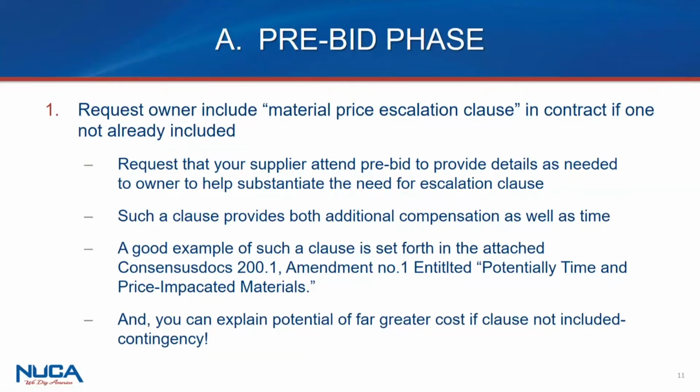And insofar as the issue that we're talking about today is driven by the material increases that start with the supplier, we really encourage you as part of that meeting, be it in person or phone, to actually include the material suppliers whose product is at issue. It's a lot easier to have that supplier tell the story, as well as that it's not just a local issue, but a national issue, as well as yourself. So we think it'll be more compelling if, when you ask for inclusion of a material escalation clause at the pre-bid phase, you make that request supported by somebody who's supplying the material that's at issue.